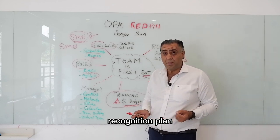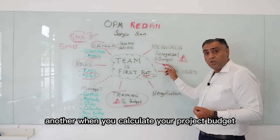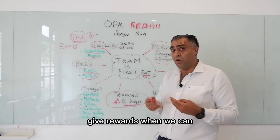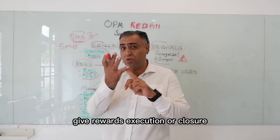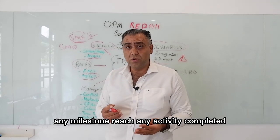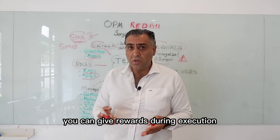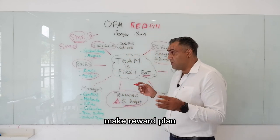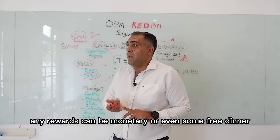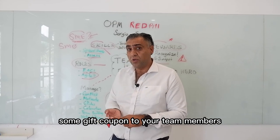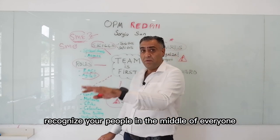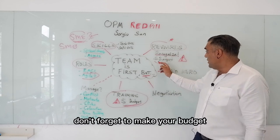Rewards plan and recognition plan — another important component. When you calculate your project budget, don't forget the rewards plan. Give rewards during execution — not at closure. Any milestone reached, any activity completed, you can give rewards. Rewards can be monetary, a free dinner, a gift coupon. Or simply recognition, which is free — recognize your people in front of everyone. Don't forget to include this in your budget.